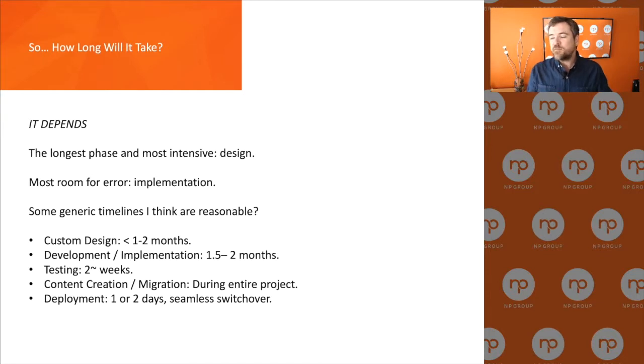It was kind of hard for me to figure out how long discovery should totally take because the first couple of steps are all in-house and internal. So you should plan accordingly for how long it'll take you guys to sit down and analyze, do the meetings, figure out requirements. Once you get to the agency and the discovery process, it's typically about 2 to 4 weeks from the discovery session where you get deliverables. So build that in as well.